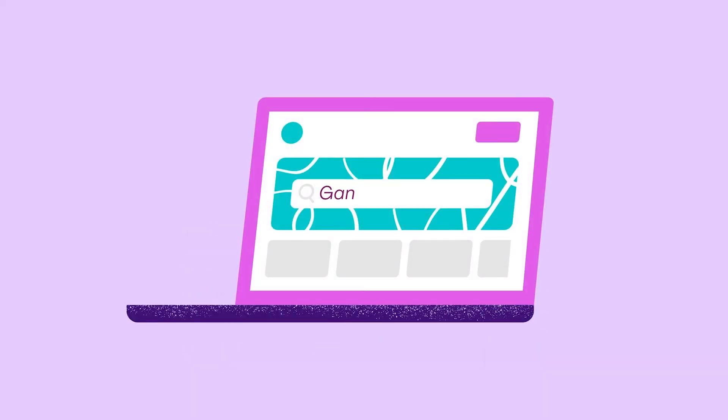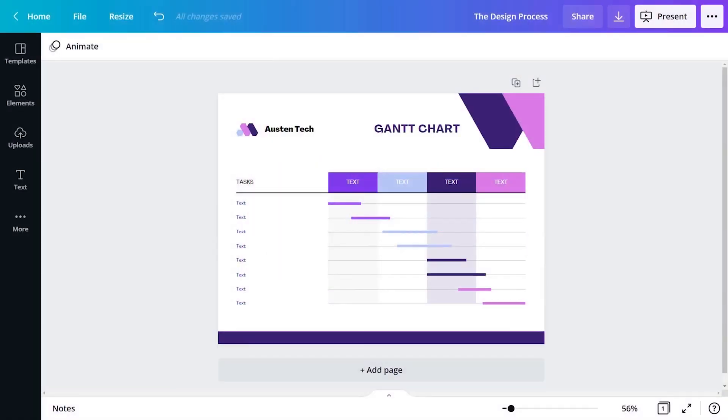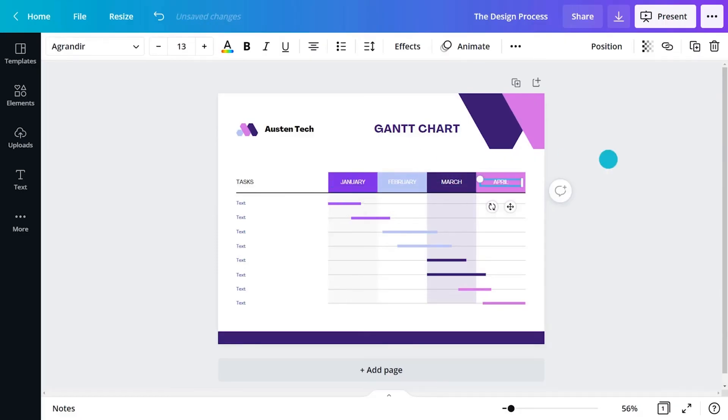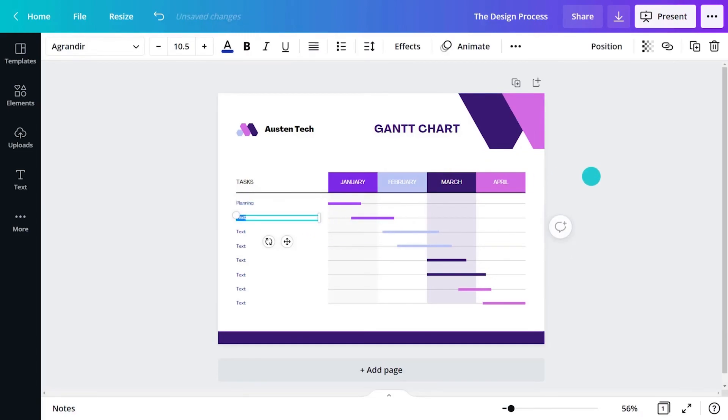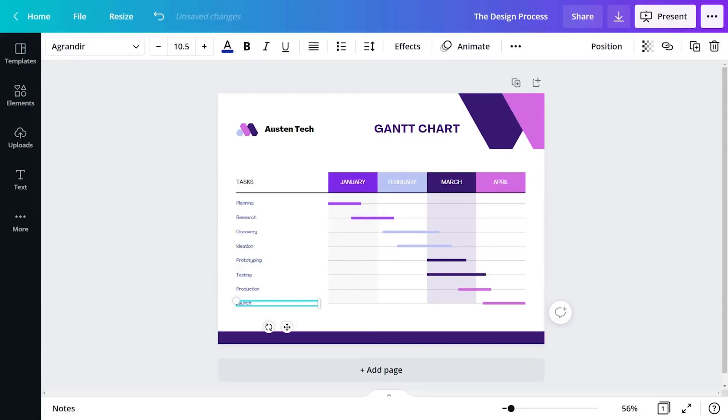From Canva's homepage, search for Gantt chart. Along the top of the chart is the project timeframe. This might be divided into days, weeks or months. Down the left side are different phases. This might be design thinking phases, like research and discovery, ideation, prototyping, testing, production and launch.